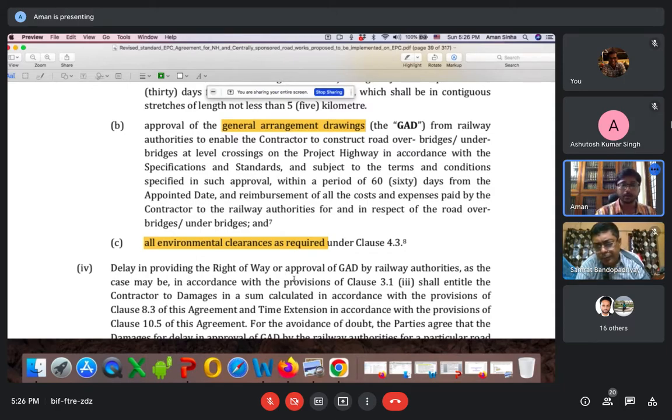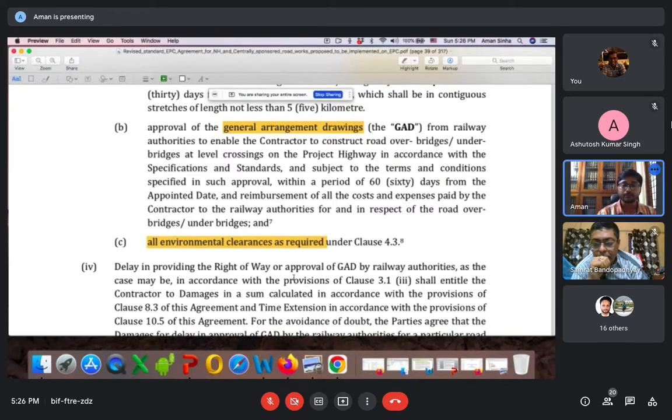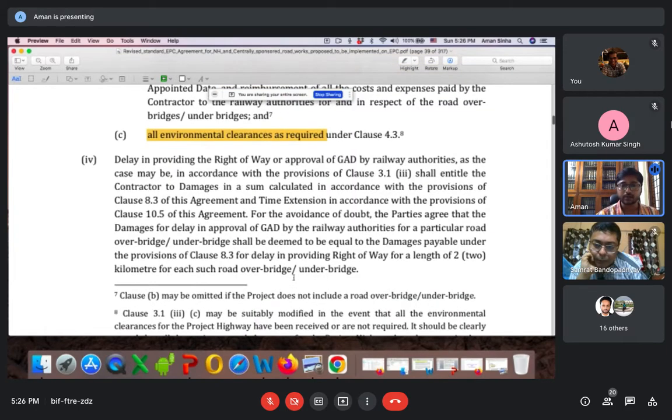And regarding this environmental clearance, what I was talking about is that when the project is situated in, say, Jammu Kashmir or in those hilly areas which are more vulnerable environmentally, the National Green Tribunal, depending upon whether the contractor is not fulfilling what is required to maintain the environment, will put a bond which is called an environmental bond. Like you have to pay a 3 crore bond to NGT to pursue the further contract. So this is on the part of the construction contract only.